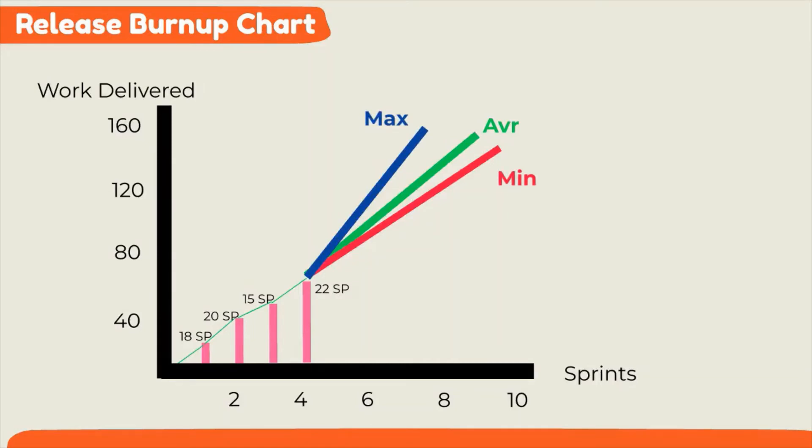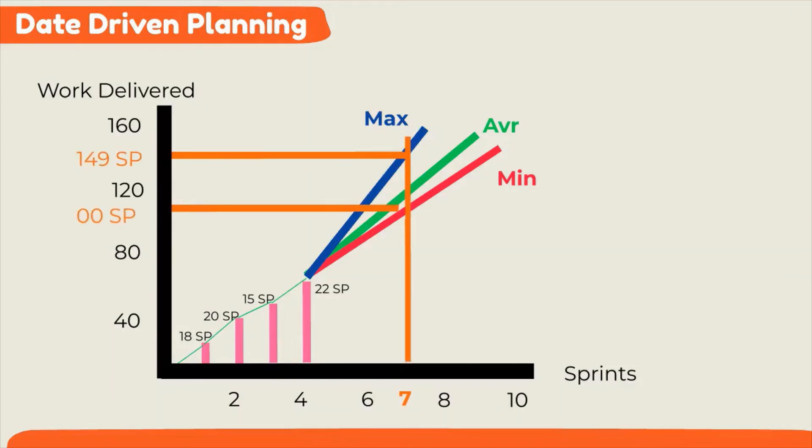Now, there are two ways product owner can engage with stakeholders using burn-up charts. First, we speak about date-driven planning. For example, if a stakeholder asks what can be delivered in sprint 7, by drawing the lines at intersection of each delivery line, product owner can tell the stakeholder by sprint 7 the team will be able to deliver between 100 and 149 story points. Product owner can then show the stakeholder the user stories from the product backlog that will fit in this estimation.